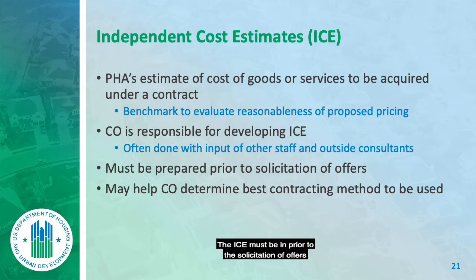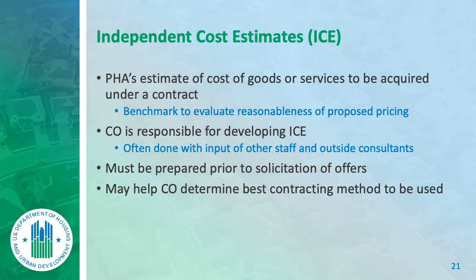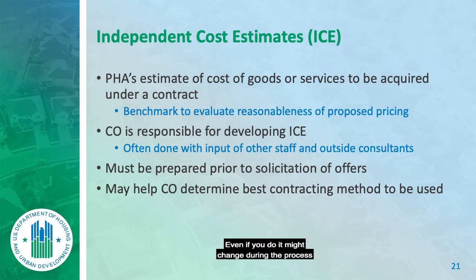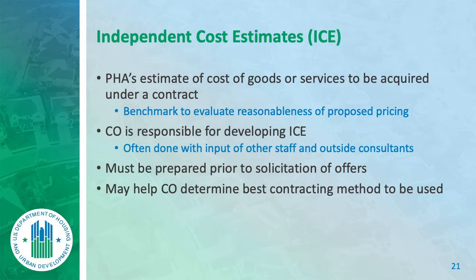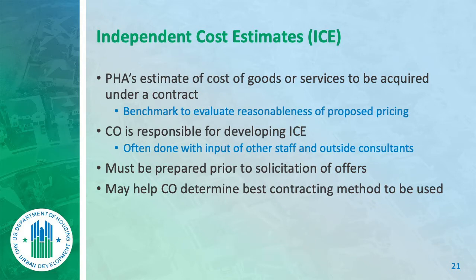The ICE must be in prior to the solicitation of offers — meaning the deadline for submittal. You can't always do the ICE before you even issue the bid or the RFP, and even if you do, it might change during the process based on questions that are asked.